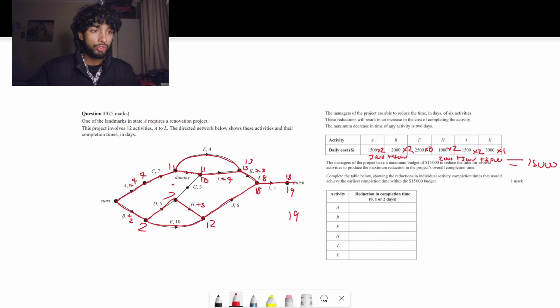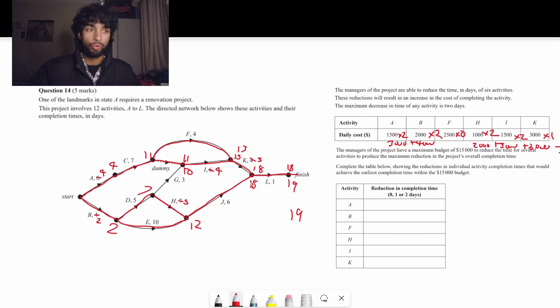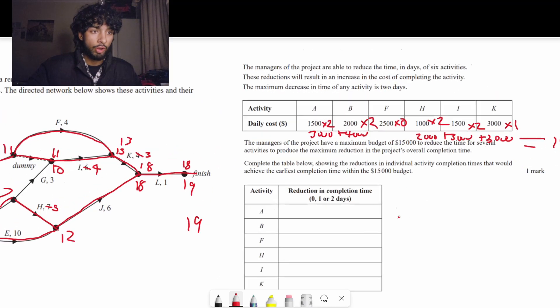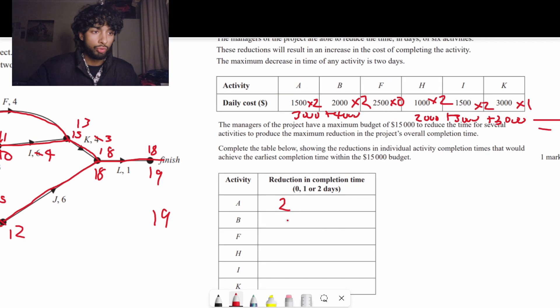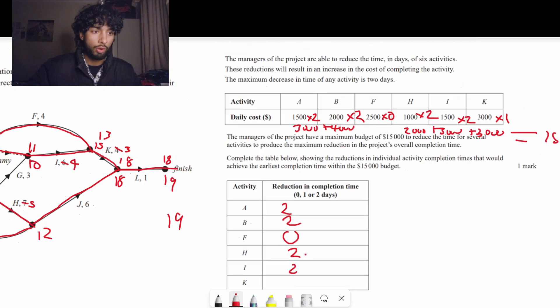So currently we have 2 A crashes, 2 B crashes, 0 F crashes, 2 H crashes, 2 I crashes, and 1 K crash. That equals $15,000. And that means we are still in the budget. And that also means we've reached that 19 goal a lot faster. So as you can see, method 2 was so much faster. So we can straight away write in our answers. 2, 2, 0, 2, 2, 1.